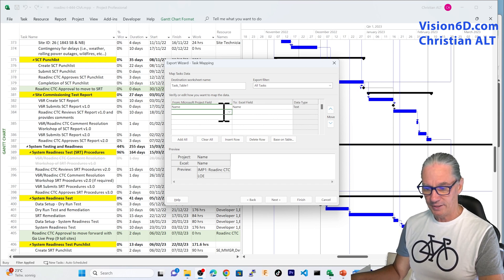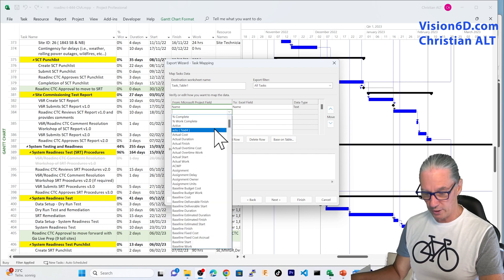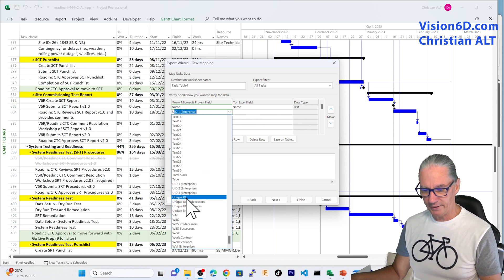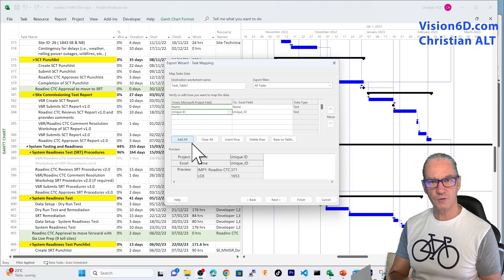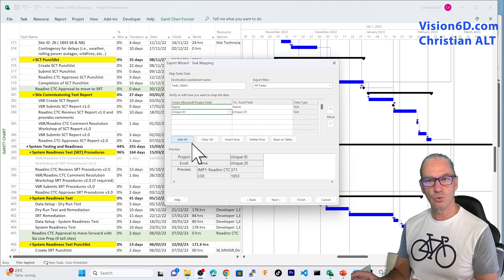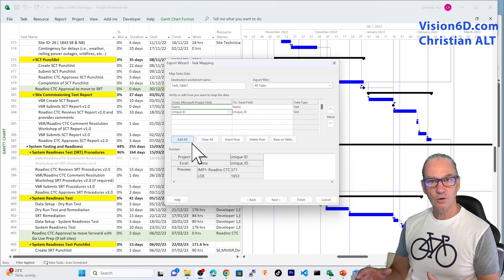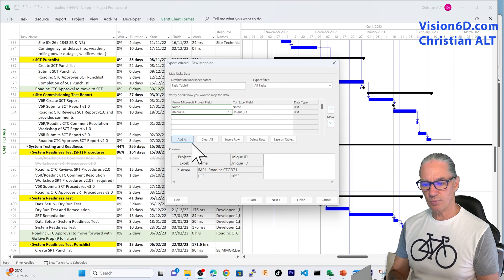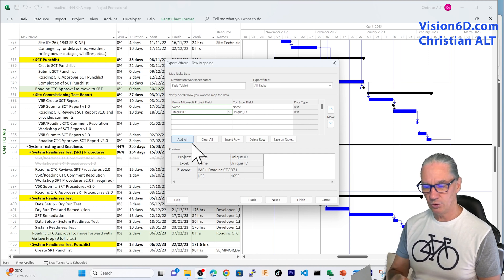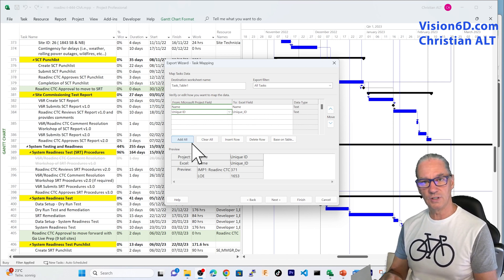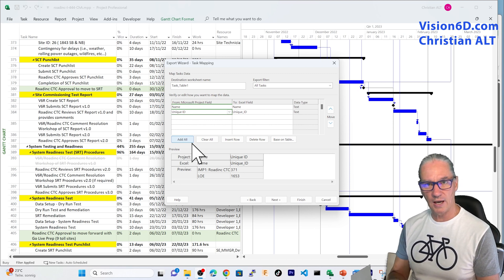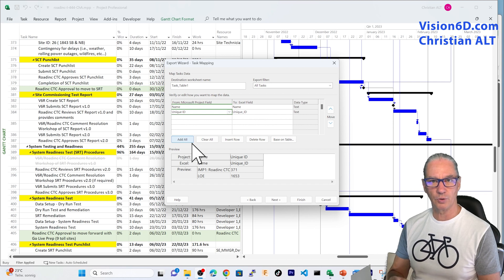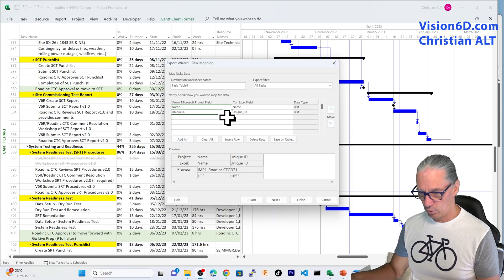An important point that I would like you to do and understand is what we call the unique ID. When you are transferring data between two systems, you must make sure that in the two systems, a task references the same activity. For this, MS Project is proposing you a unique ID. That unique ID, if you delete a task or you add new tasks, MS Project is making sure that that number is really unique in order to identify the task.